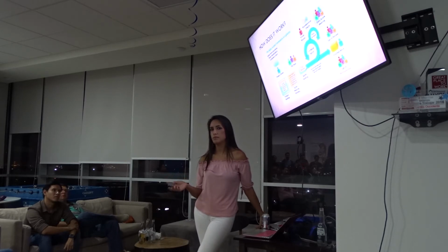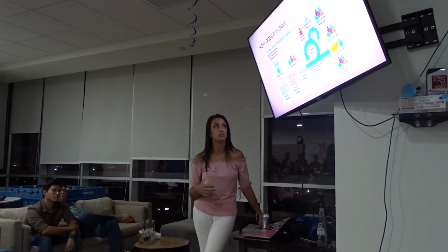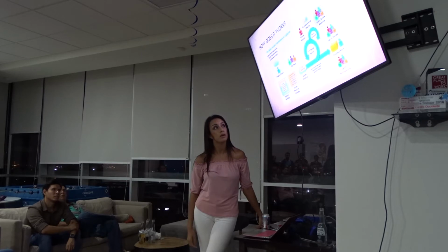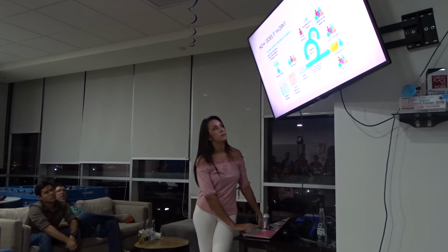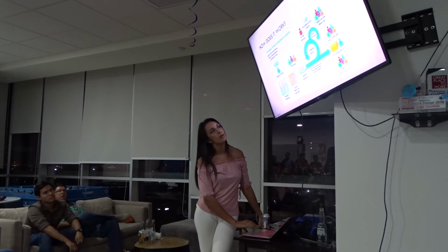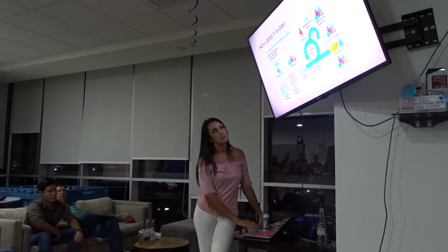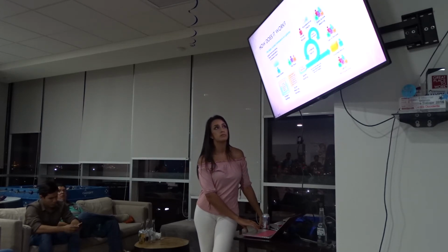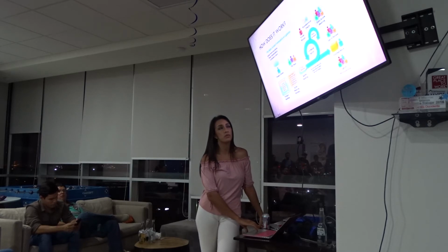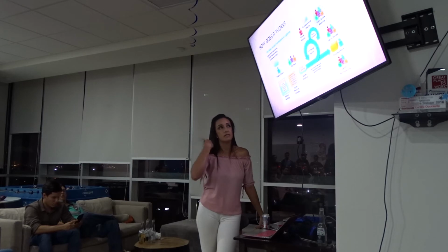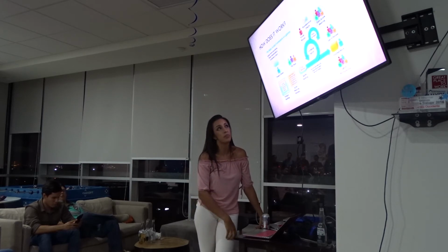So based on those metrics that your team has, you can know how much work you can put into the sprint planning, or how much work you're not going to put in. So then, as I mentioned, sprints are normally worked in 1 to 4 week sprints. You're not recommended to have more than 5, 6, 7 weeks in one sprint.